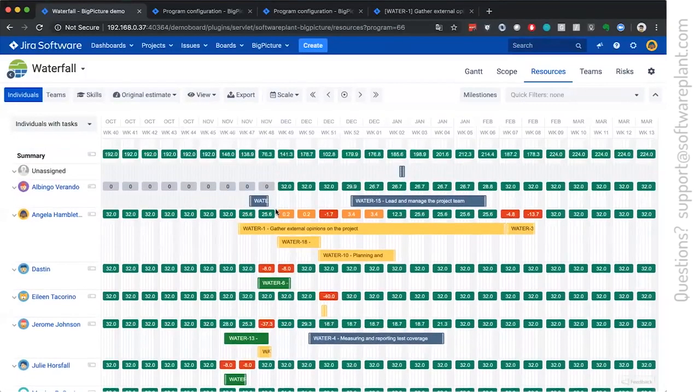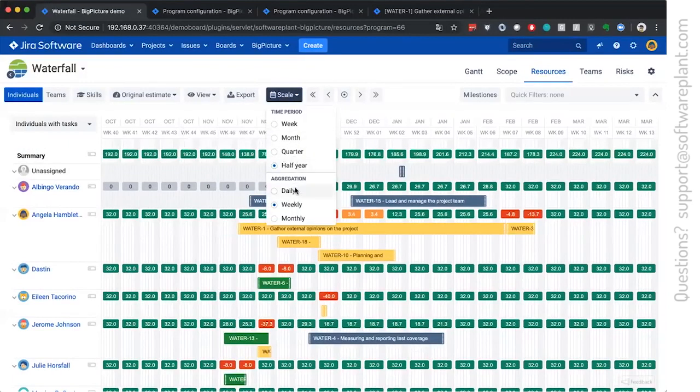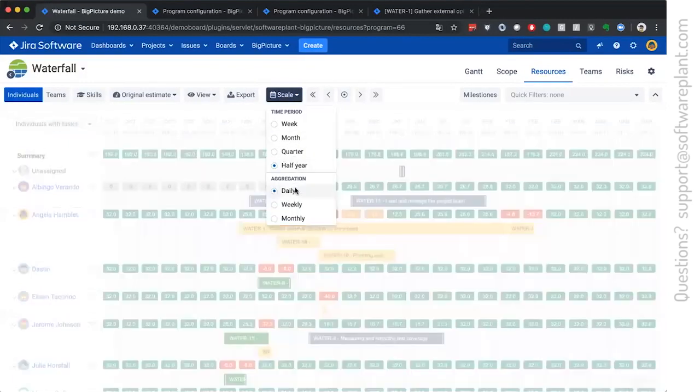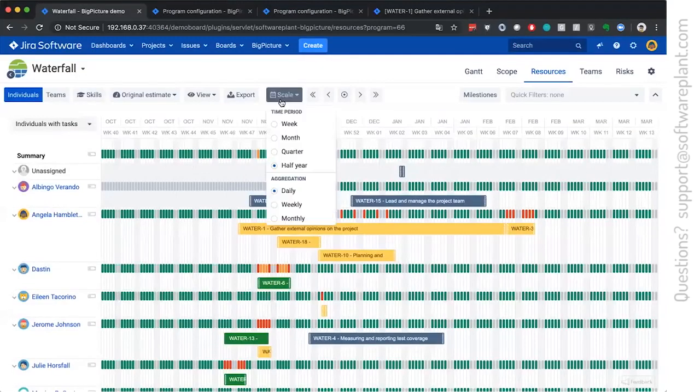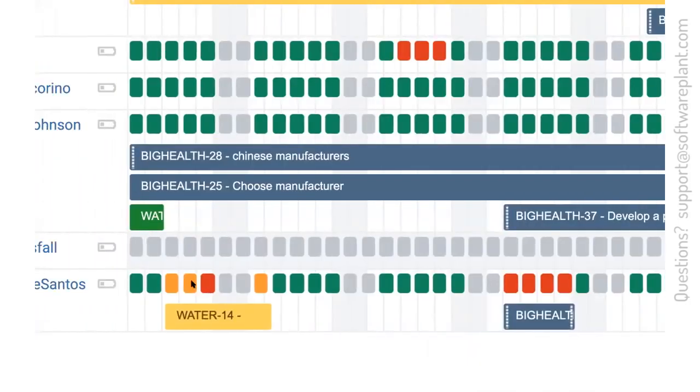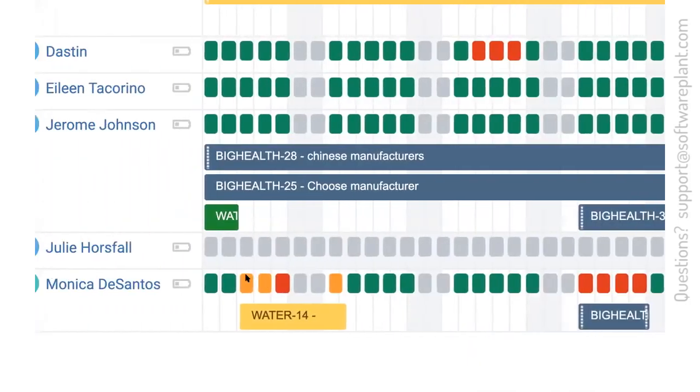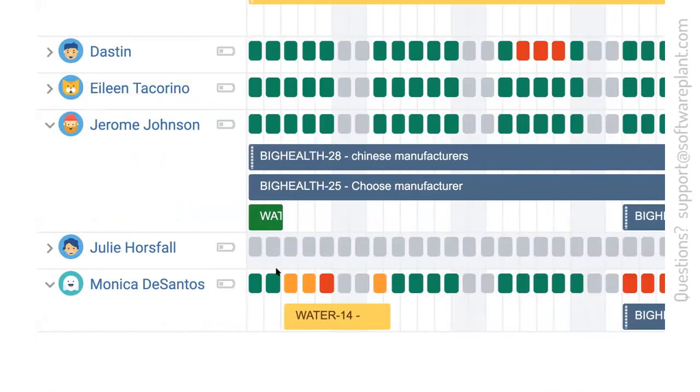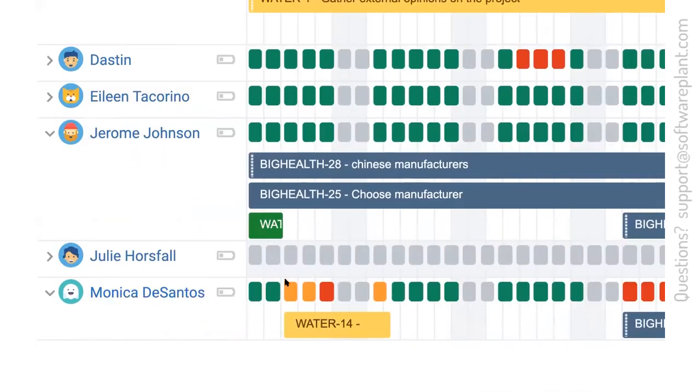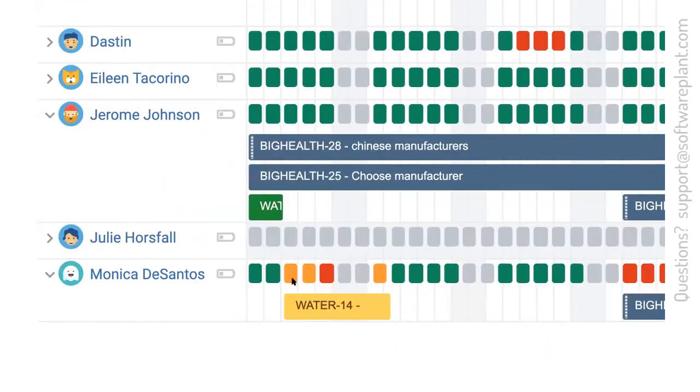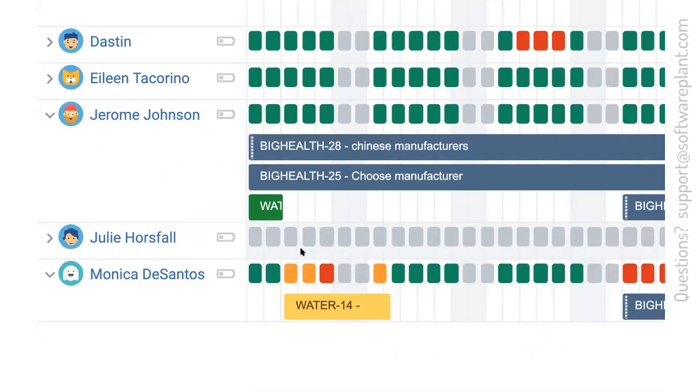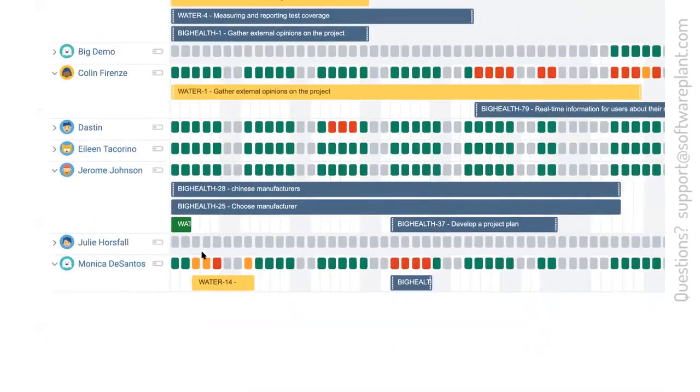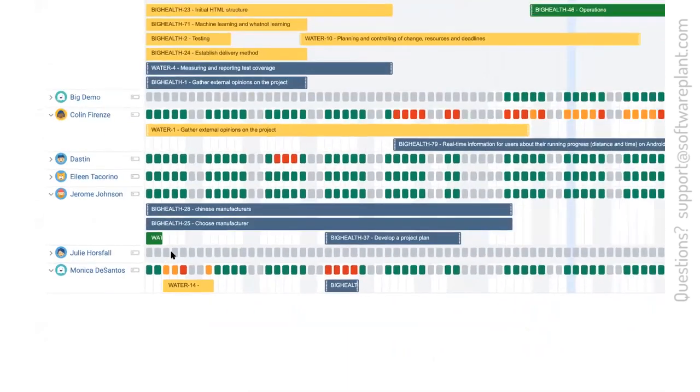So, next step for big picture is to show you whether somebody is over allocated, under allocated, or what's the status in general. This is the orange color which tells us Monica de Santos on this day is allocated between 75% of her capacity and 100. Anything above the 100 goes to red.